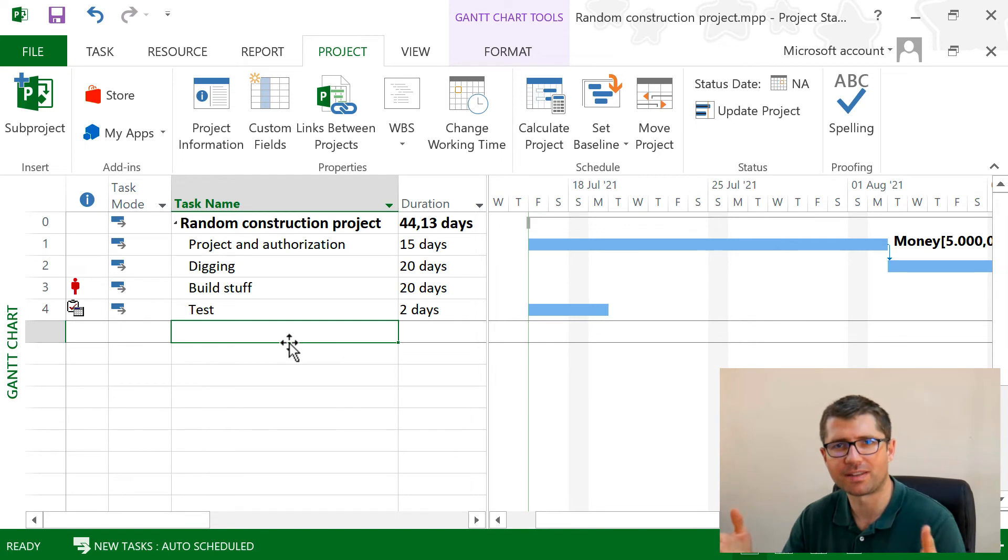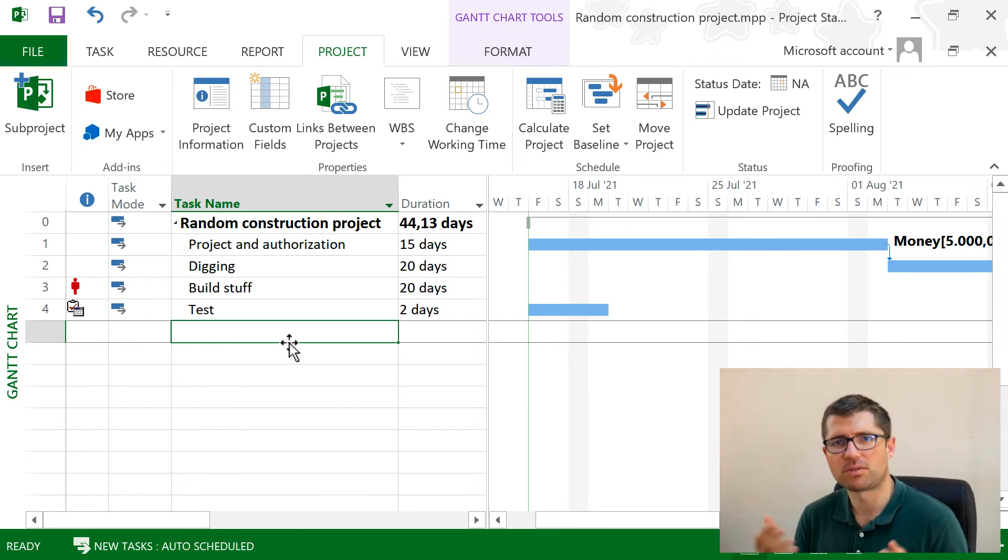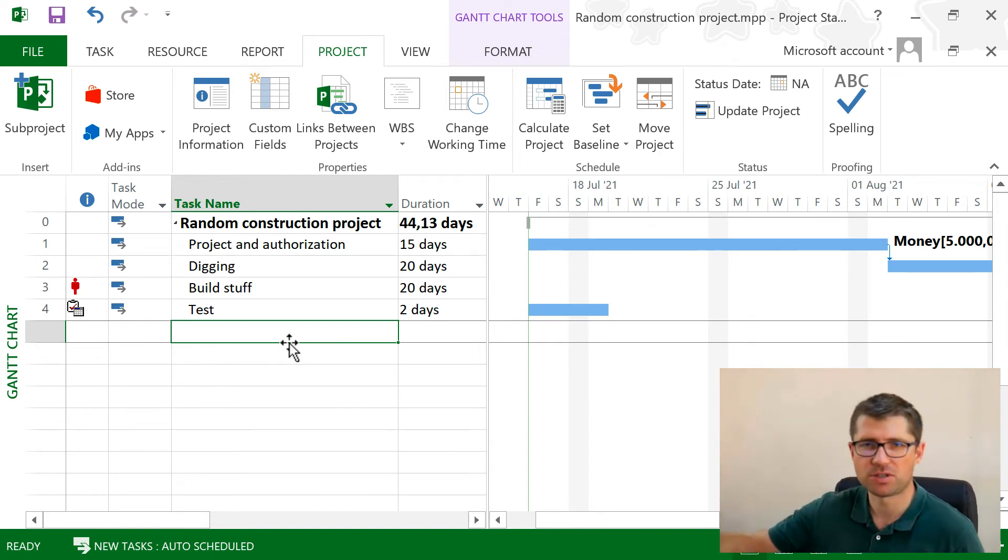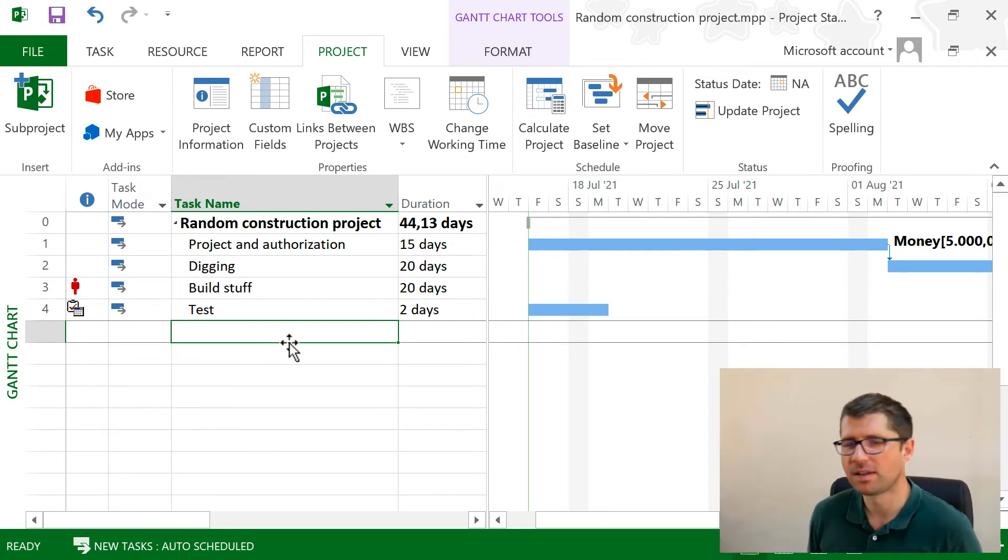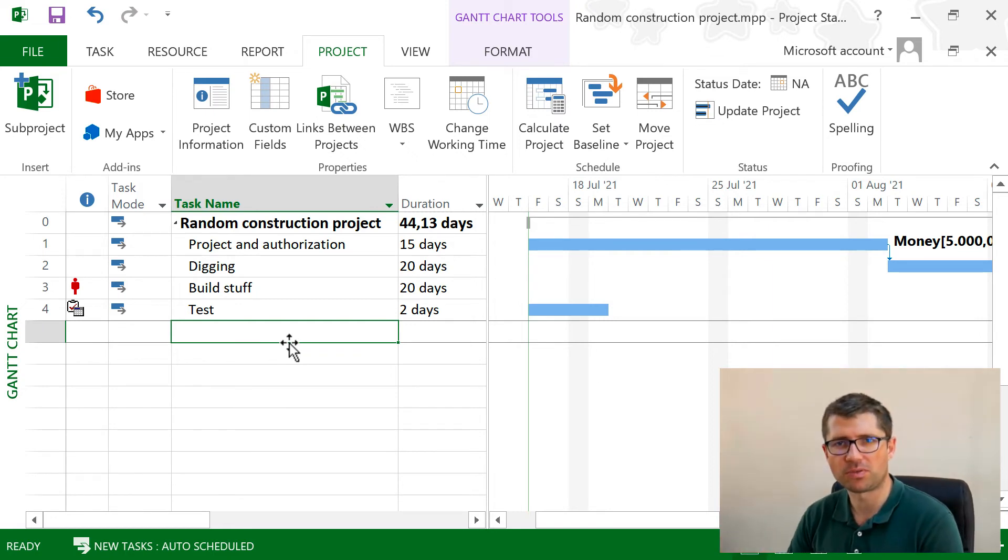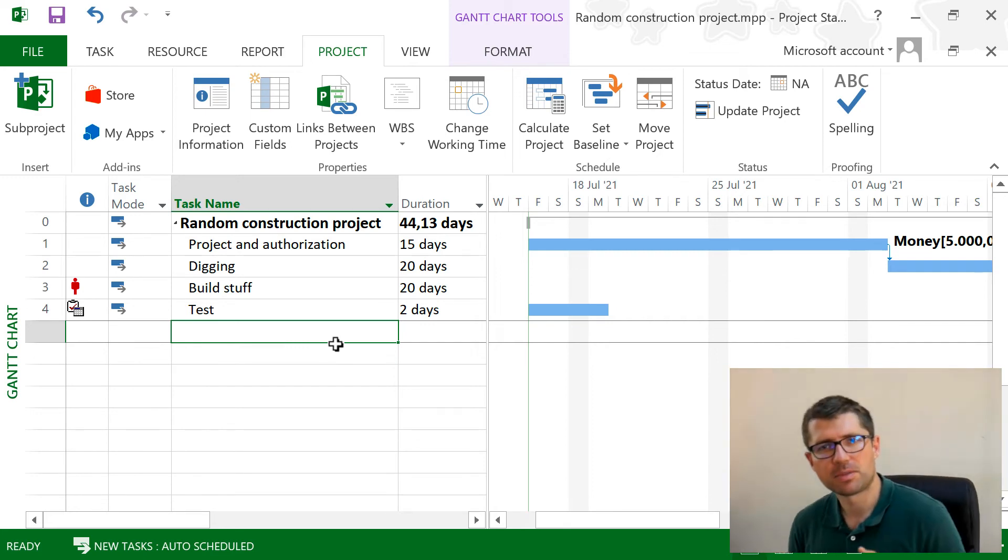Because it's one thing to have a task that has five hours of working time versus 20 hours of working time. If I put it into Night Shift, it's much shorter than if I put it into Standard, in which I'm working from Monday to Friday.